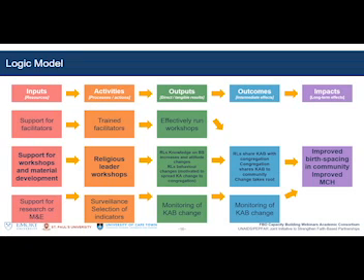By working through and talking about the kinds of inputs that would be necessary, the kinds of organizational capacities and relationships between the academic consortium and country partners, the kinds of activities that would have to be carried out to do that comparative assessment, and the burden of carrying it out, we were able to demonstrate to PEPFAR and UNAIDS, that's a great question, but it's not feasible for us in this time frame for this project to do that kind of comparative analysis at a national scale.